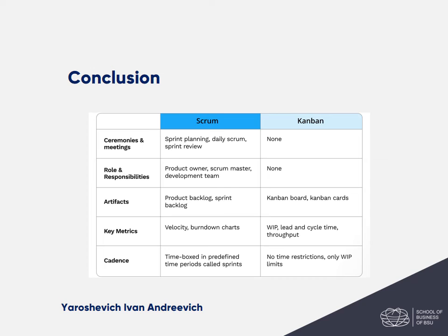The main differences between Scrum and Kanban are in the work schedule. Simply saying, Scrum is Kanban with clear temporal settings. In Scrum, these are regular sprints with a certain duration. In Kanban, these are ongoing processes of completing tasks. Product release in Scrum occurs at the end of each sprint. In Kanban, this is continuous delivery.